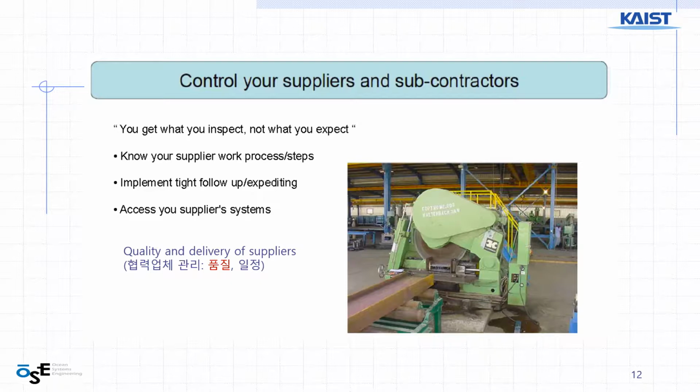So if you don't have a main engine, then you cannot connect it to the propeller, and also you cannot close out the engine room space, so the above structure cannot be constructed if no engine is coming. So scheduling is important.